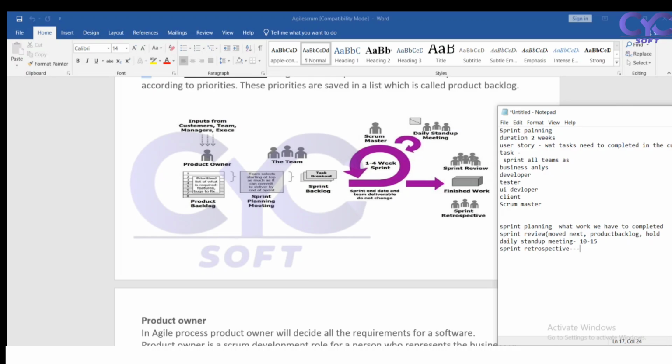In the retrospective meeting, we discuss the capacity, meaning the total available hours. For example, 5 developers working for 8 hours is 40 hours. How much work can they do in 40 hours? Is there any adjustable time or not? We will plan it.